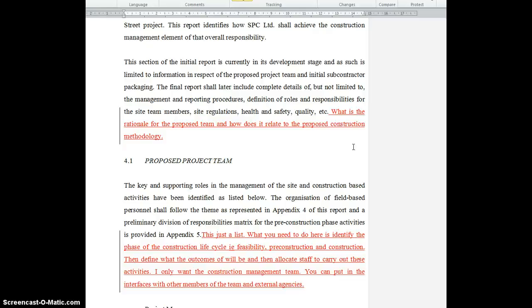Close the bracket, then you can see from what you've done, review each of the people that you're going to be in your team, when they're going to be involved, what they're going to deliver, i.e. this is what they're responsible for, and this is how they're going to do it. You could then draw your organisational chart.